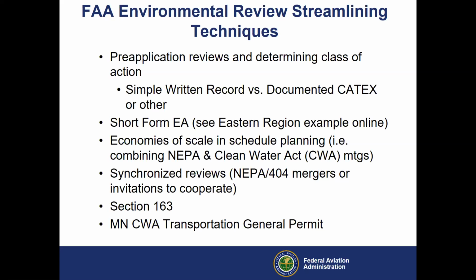Short form EA, that second bullet. We've been kind of using this here lately. If you go back, say 6 or so years, we had a short form EA. Some people called it a condensed EA. That was kind of a streamlined way of reviewing projects under the merits of an EA. What we've been doing now is our FAA Eastern region has an example or an actual populatable document online. Simple Google search. You can take that and then we'll hybridize it to fit our project.